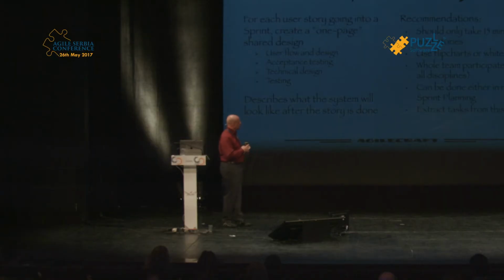Again, it shouldn't take more than 15 minutes. If you spend more than that, it's either because the story has not been well understood, or it's too large, or we just didn't do enough clarification up front. Maybe 5 to 15 minutes per story is the ideal time. Again, use physical components, physical tools, physical presentations, and it should always be the whole team.